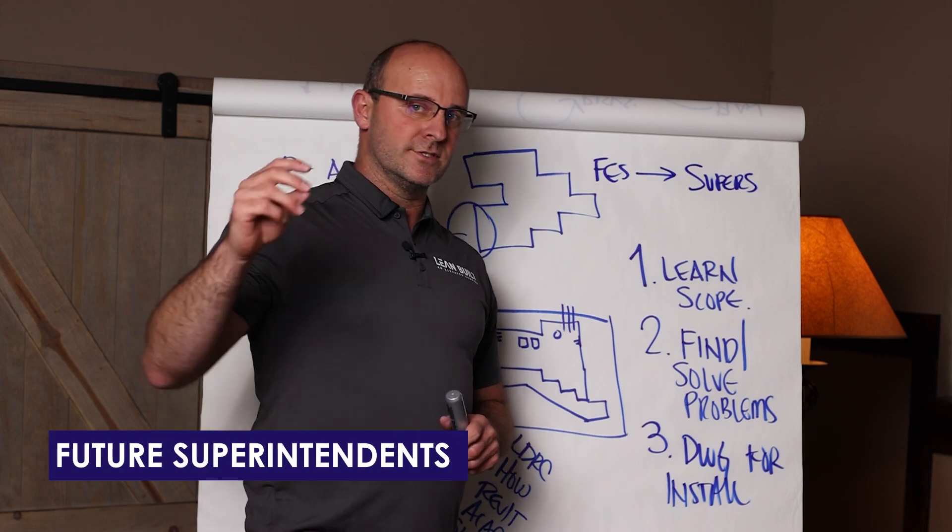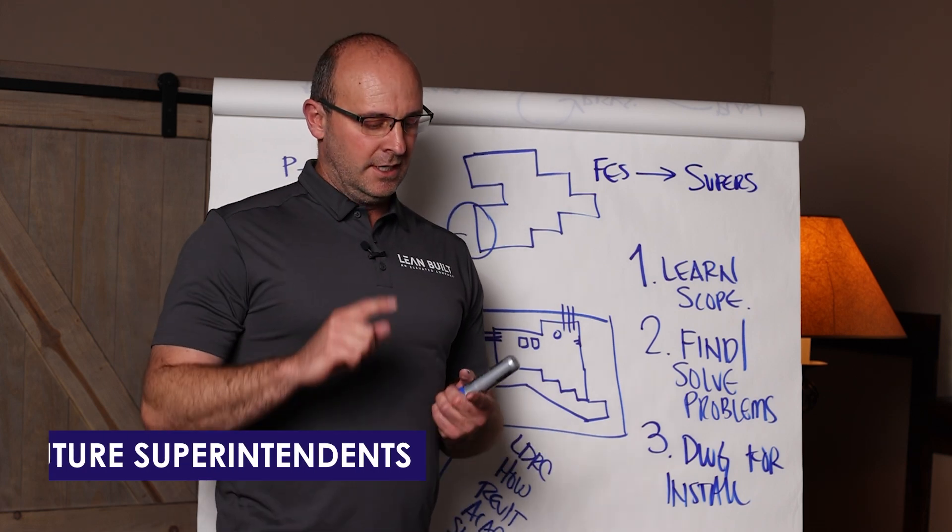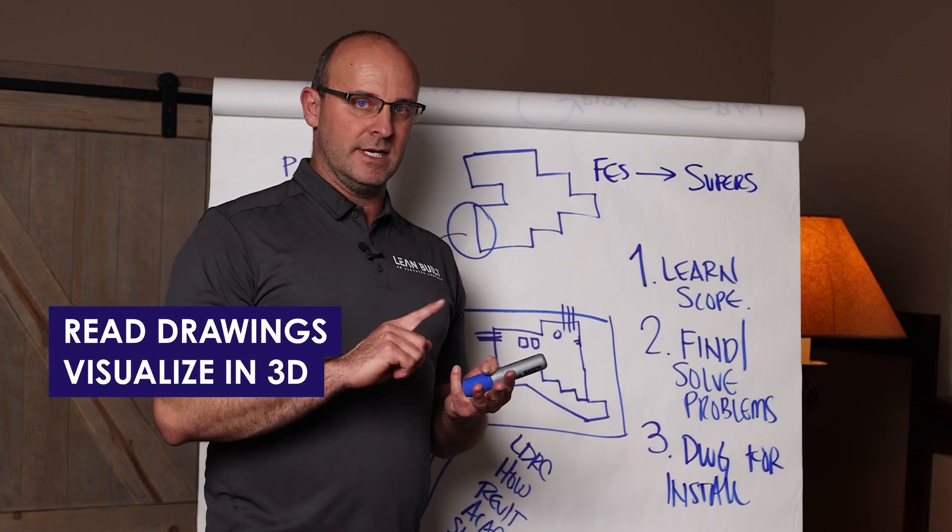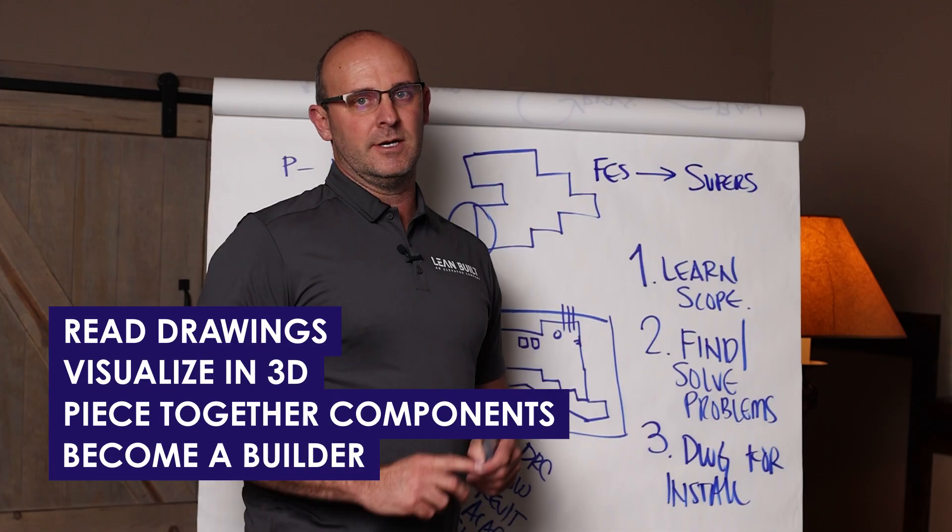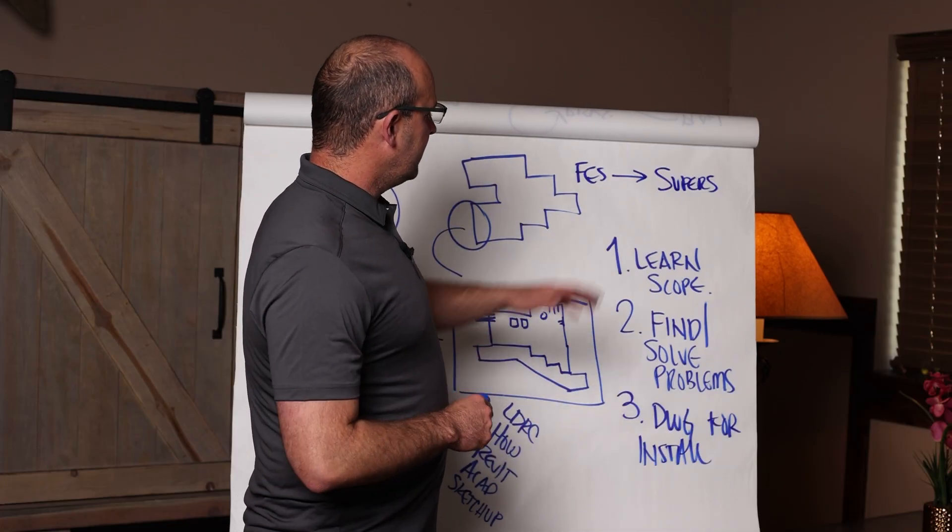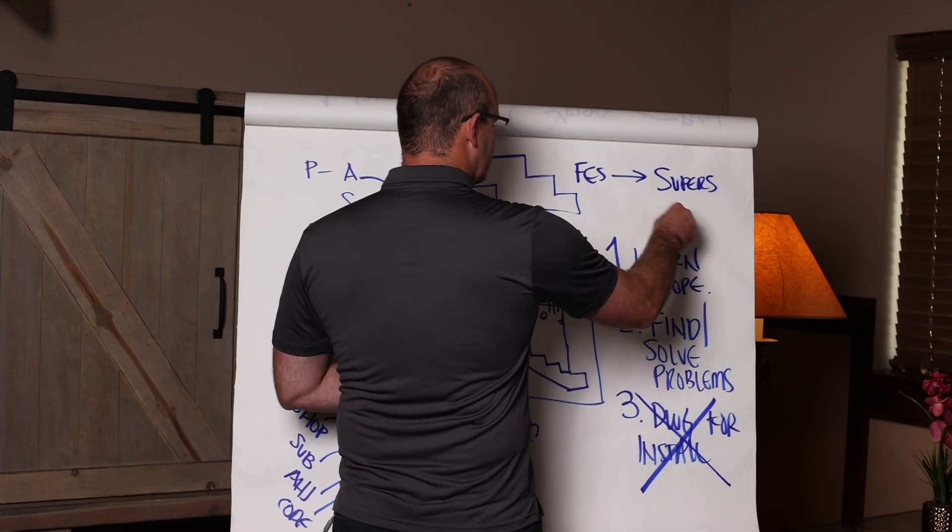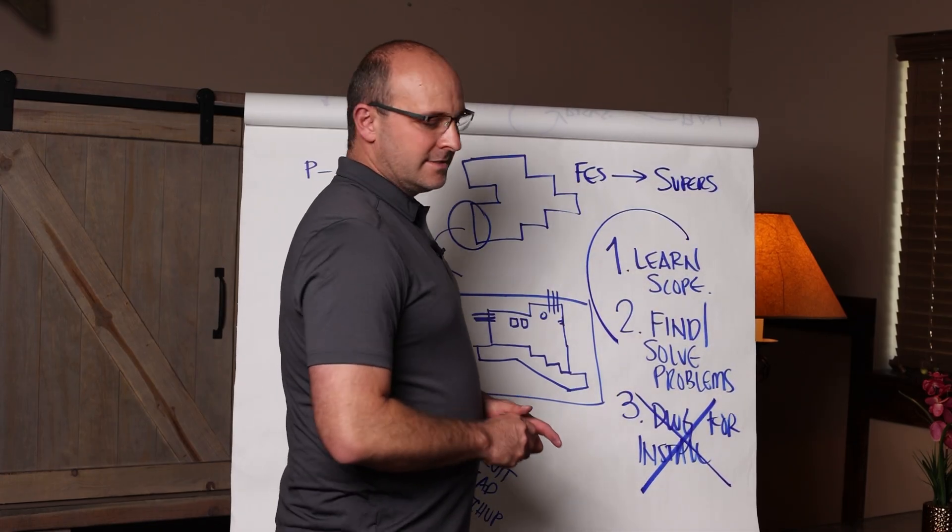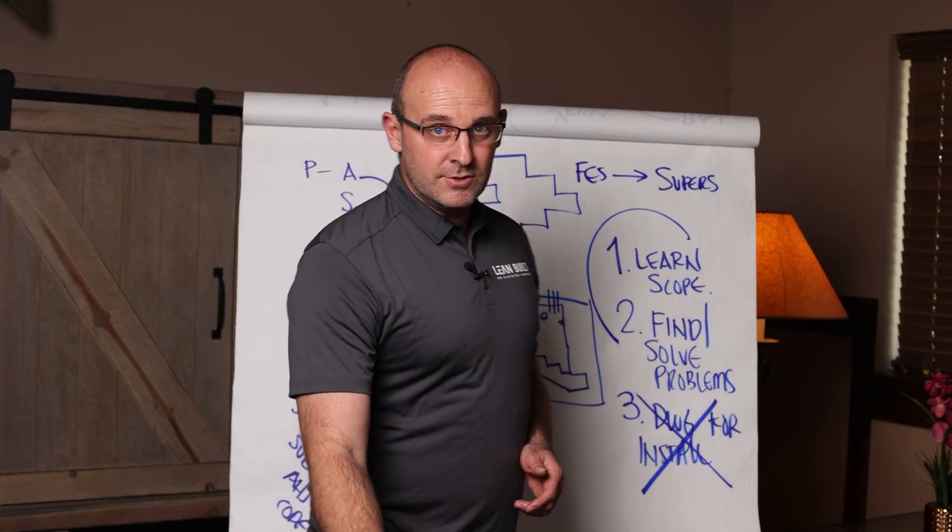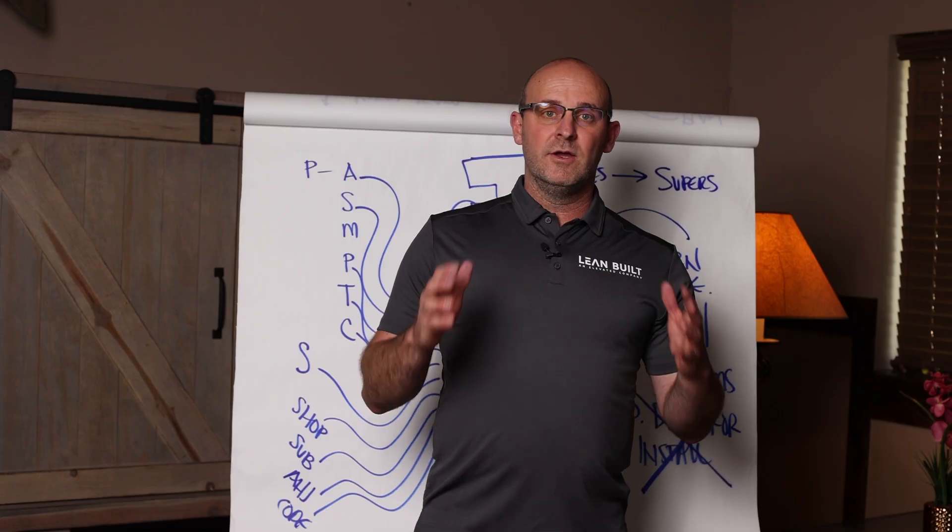That's the purpose of lift drawings, to train future superintendents, read drawings, visualize in 3D, piece together components, and become a builder. One, two, three. That's the way to do it. So even if you didn't use the drawing to install in the field, you've still trained that builder. This is why field engineers do lift drawings and what they use them for.